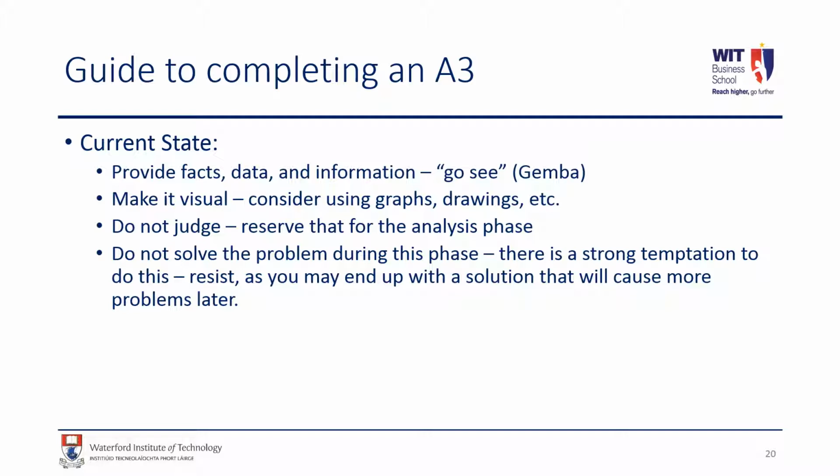Just physically go there and investigate, get all the useful data, maybe talk to the operators there, and then think about how we're going to present that data. So make it visual, use graphs, drawings, etc. We're not trying to judge our data here, we're just presenting the data as it currently exists. Okay, we're not jumping ahead to the solution, and that's really important.